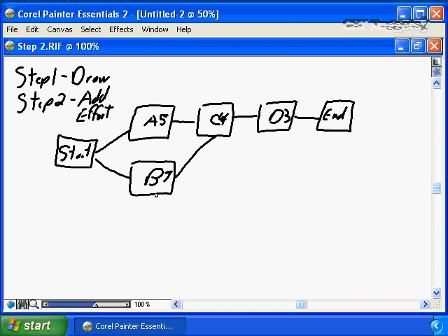The same for B. The resource that's going to work on B, which is an independent resource from A, because I'm saying they can happen in parallel, is going to take 7 days of dedicated focus effort to get the job done. C is going to take 4 days of dedicated focus effort. At this point, it doesn't matter which resource is going to work on it.